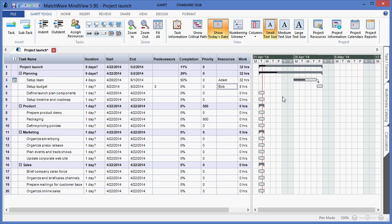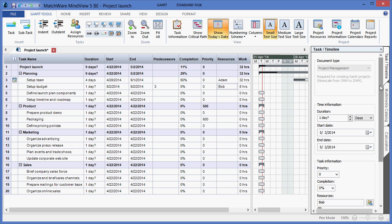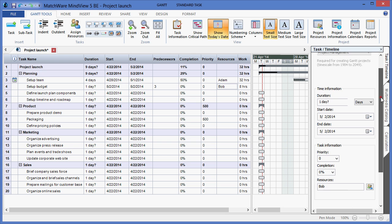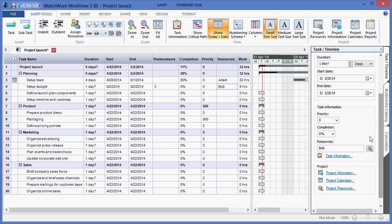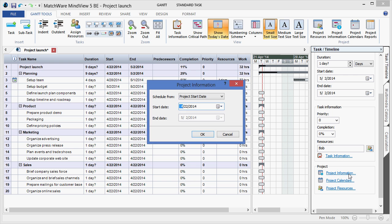By locating the task timeline panel from the right side of my screen, I can also include some further project information. Here I can determine the true project start or end date by selecting project information.